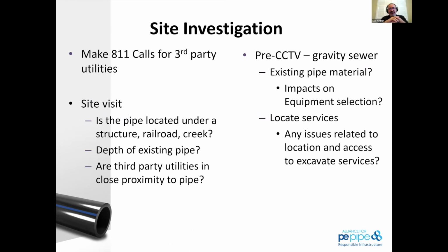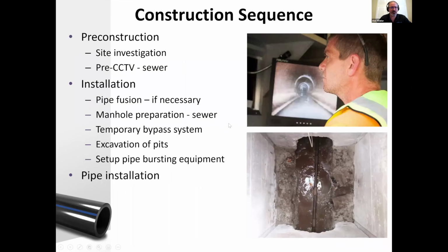So we'll look at site investigation again. Those activities that have been done during the preliminary and design elements are now under the ownership of the contractor. So sometimes a lot of the same work has been done again, but the contractor is now the one responsible to make sure that they check off all of these items and make sure that there's nothing that would compare or stop the actual bursting operation as it moves forward.